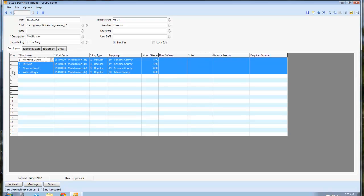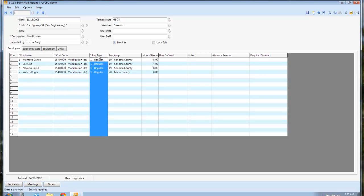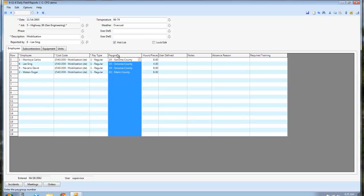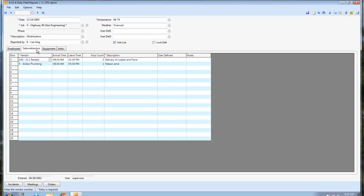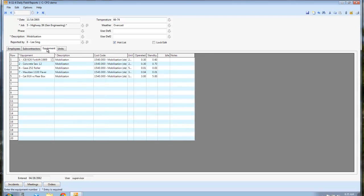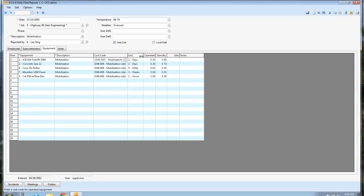And then down here, you'd be entering who the employee is, what item of work they do today, is it regular time or overtime. If you're doing prevailing wage certified projects, what certified class he's working in on that day and that task, and then how many hours did they work. So you have that recorded. And then if you had subs out there or suppliers and you wanted to track who was out there, you can do that here.